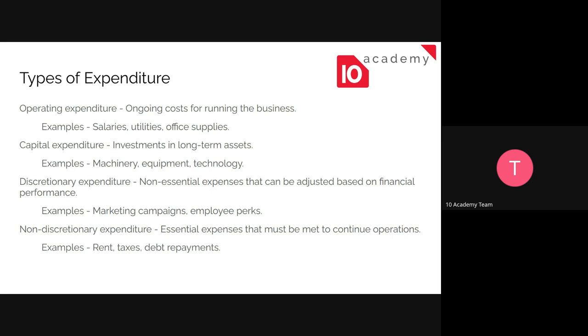I'm just asking if you have things clear up to this point, but just to answer them, let's start from the last one. The contingency budget is not a must to be 5%, but it's usually 5% of the whole budget. It doesn't depend on the expenditure or anything else; it's just there to meet your unexpected expenditures. So it's not that much, but it could grow depending on the scale of the company.